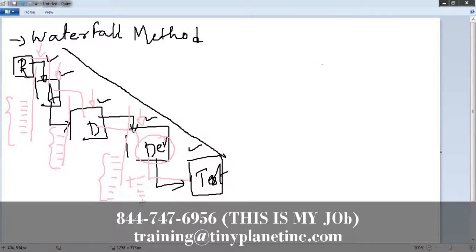So it's like 90% done and 90% not done, right? I mean, 90% of the work has already been completed. The development team has already started working on it, and now you say, okay, no, stop, some more requirements are coming. So the requirement, analysis, and design guys have to work on it, and then it has to be given to the development team. This is time-taking, right? Yes. So those are all the risk factors which come with the waterfall methodology. So these are the advantages and disadvantages of the waterfall methodology.